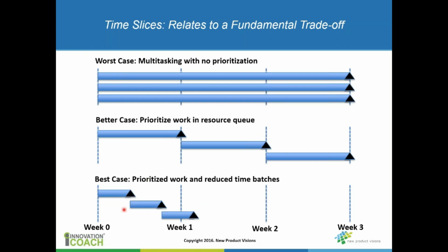So if you break up the work into smaller chunks and synchronize it with the other content providers, then this will work. It's not like multitasking, but you can break it up and you keep all 3 projects moving forward, because really the reality is that if you do it strictly in this fashion, this lower priority task is always going to get shortchanged on resources.